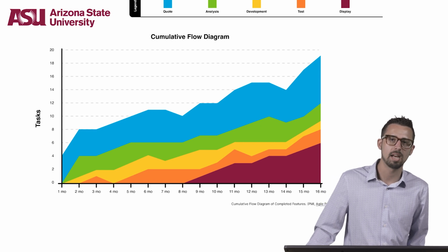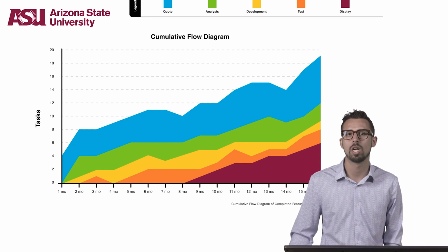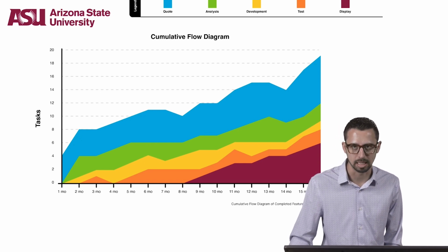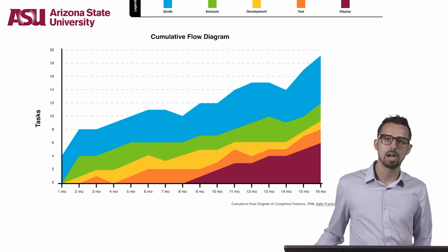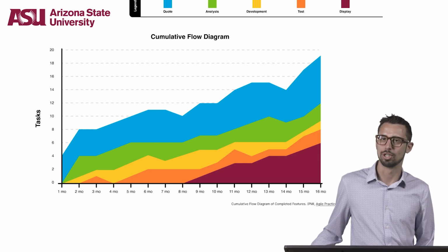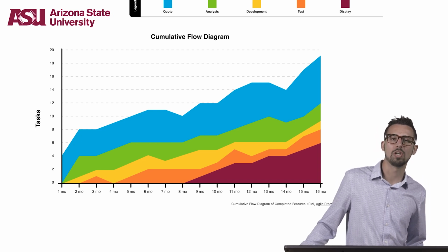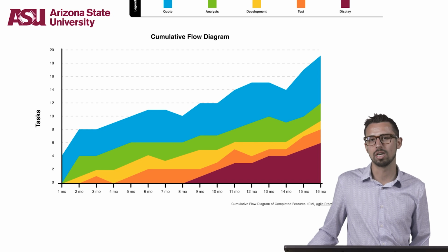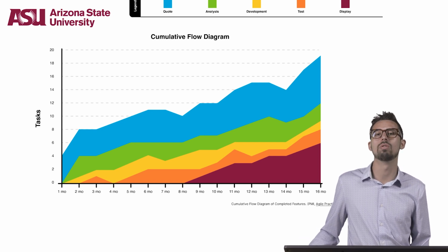A lot of teams have trouble with accumulating work, meaning they have work in progress rather than work completed. When teams have a lot of work in progress, the project gets delayed. That's just how it works. The longer it takes for a team to deliver tasks and features, the more pressure a team will have as more tasks get added to the project.